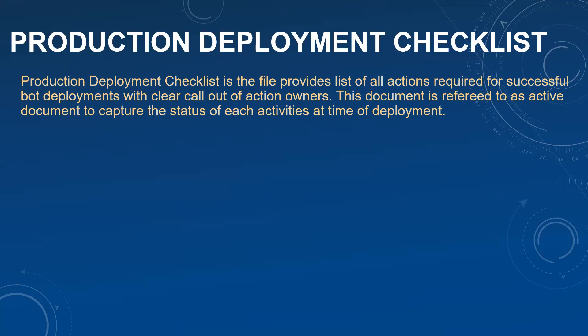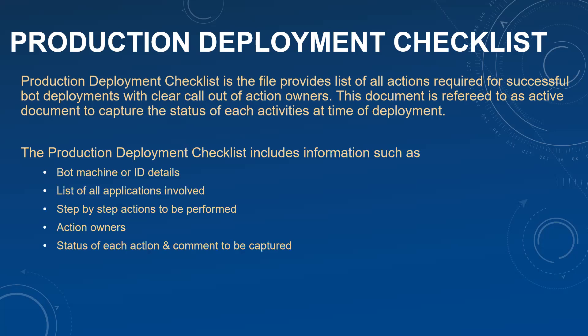When we look at all actions listed, it is also a clear call-out of who are the action owners for those actions, so there is no confusion at go-live about who needs to perform which actions. This document is referred to as an active document at the time of go-live to ensure each step is followed by the respective person and nothing is missed. It includes details such as bot machine IDs, list of applications involved, step-by-step actions, action owners, status of each action, and any observations or comments to be captured.